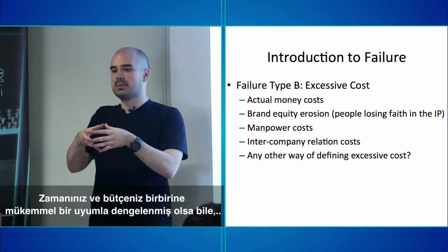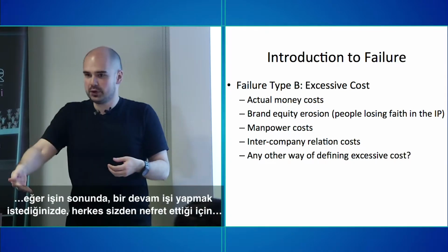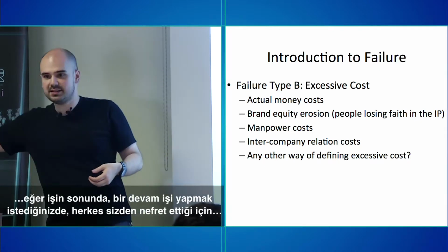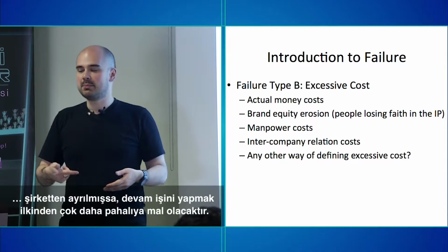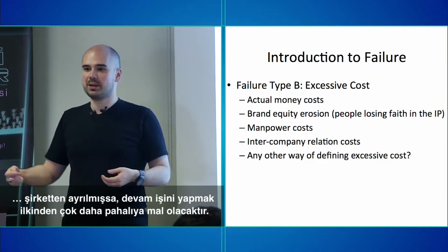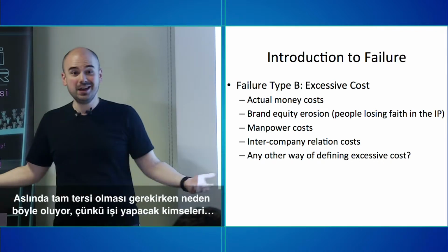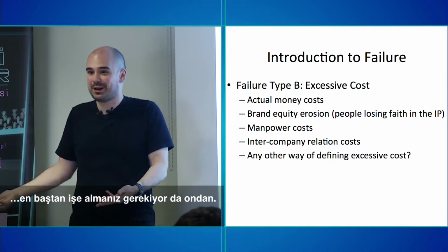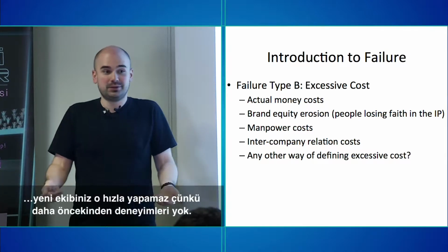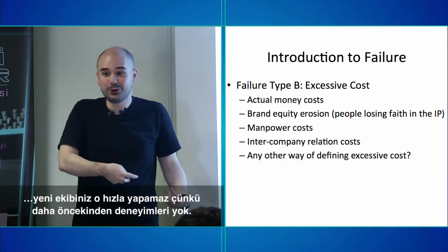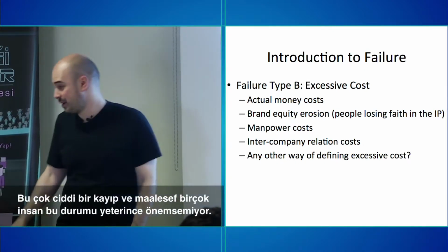Even if your time and budget were perfectly managed, if by the end of the project, when you want to make the sequel, everyone has left the company because they hate you, then making the sequel is going to be more expensive than making the first game, when in fact it should be the other way around. Why? Because now you have to hire a brand new staff. The previous staff could have made a sequel like this. The new staff, they can't because they didn't make the first one. This is massive, and a lot of people sadly don't take this seriously enough.